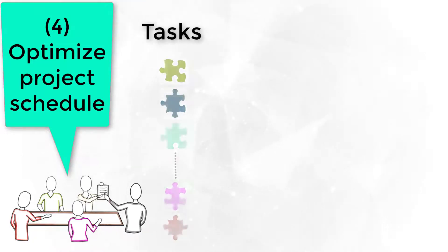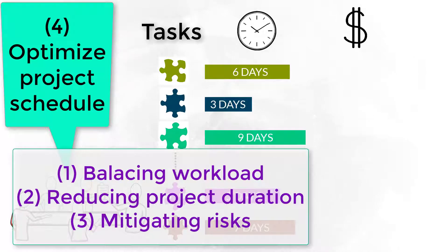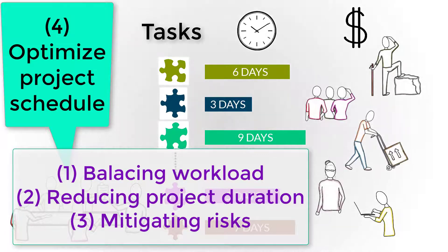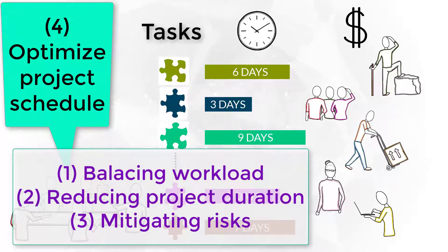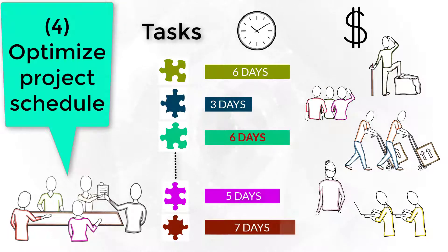The fourth scheduling step is when we try to optimize the project schedule. The three most important optimization strategies are: balancing resource workload — making sure that each team member has a realistic work hour planned in a period; verifying if you can reduce the project duration by allocating extra resources for a task; and evaluating execution risks, possibly accommodating buffers between tasks.